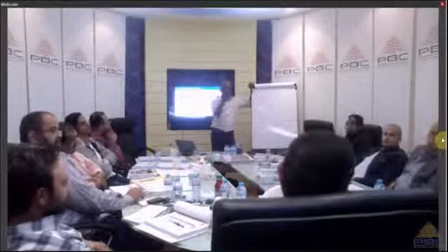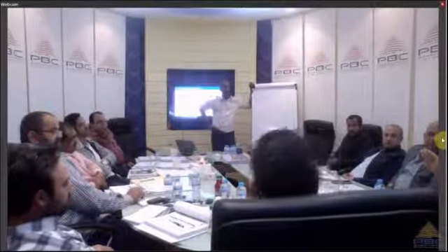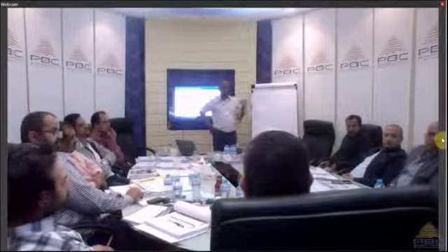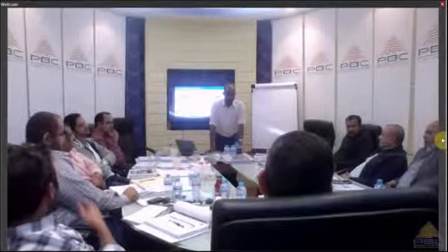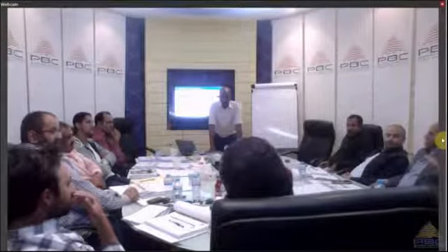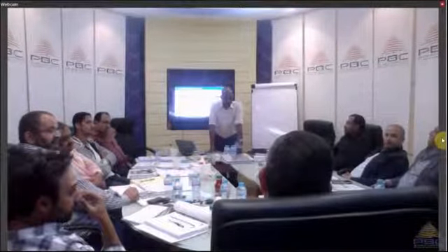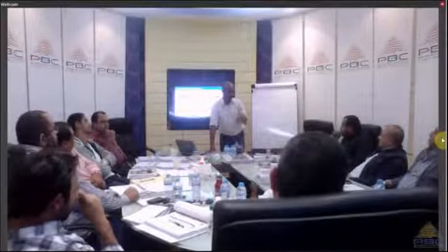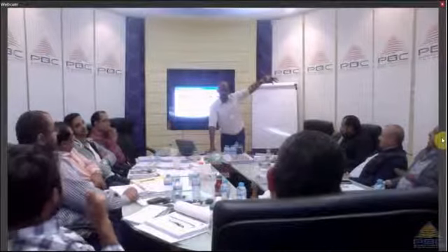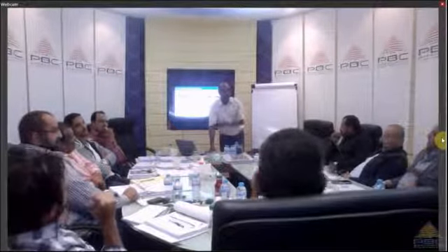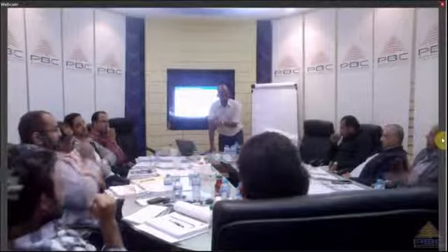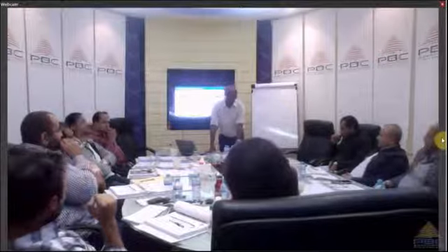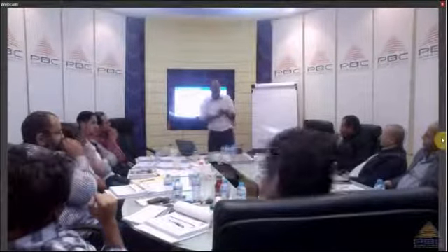In terms of hours, it's the same, but the rates for the manpower change based on the market. Who changes it? Who's in charge of that database? When we have new workers in the country, they add more money. Is it your company's database or a centralized database? It's ours. At every project's completion, the project manager will furnish the head office with all these new details. So it's constantly updated.